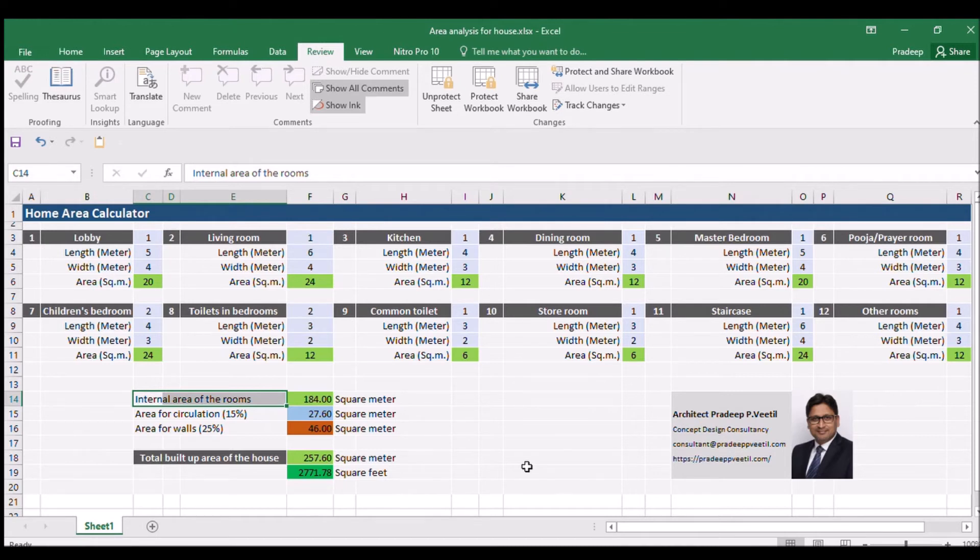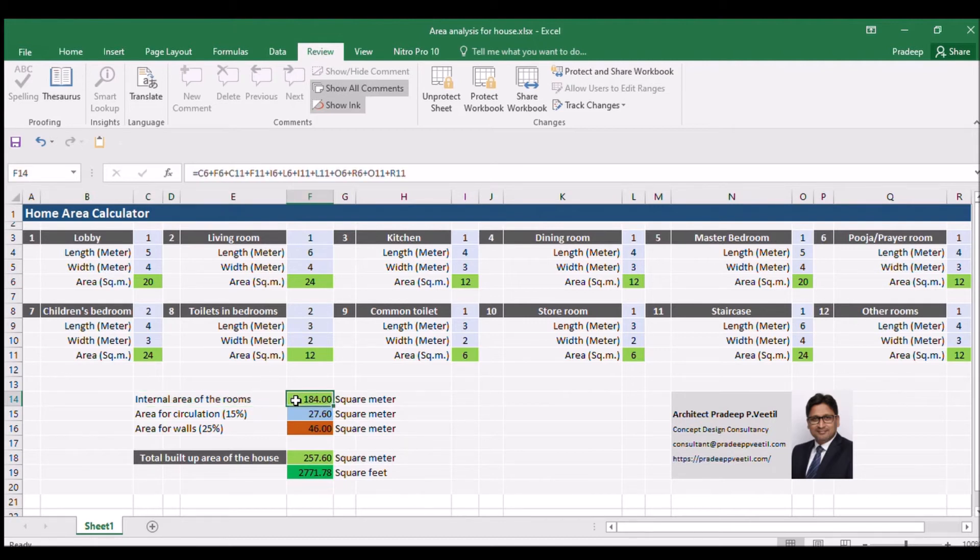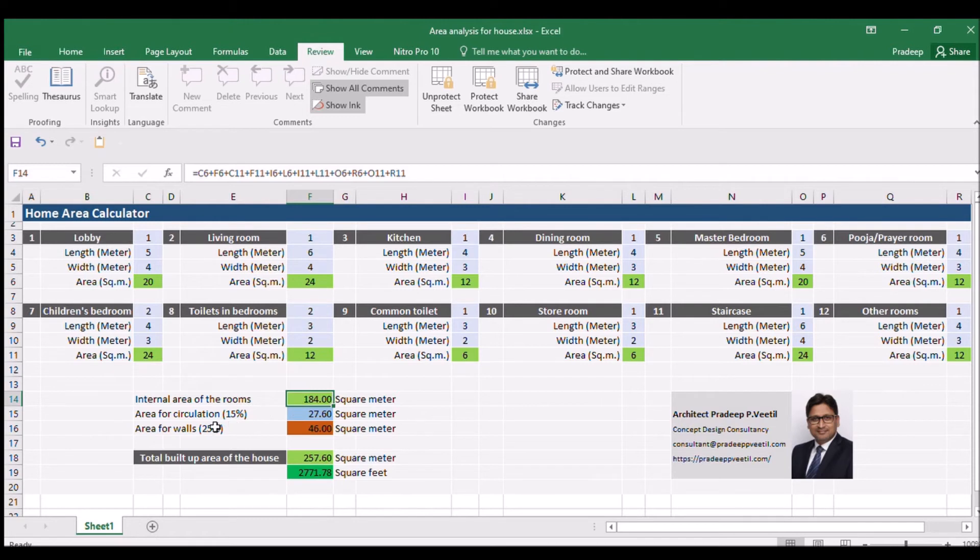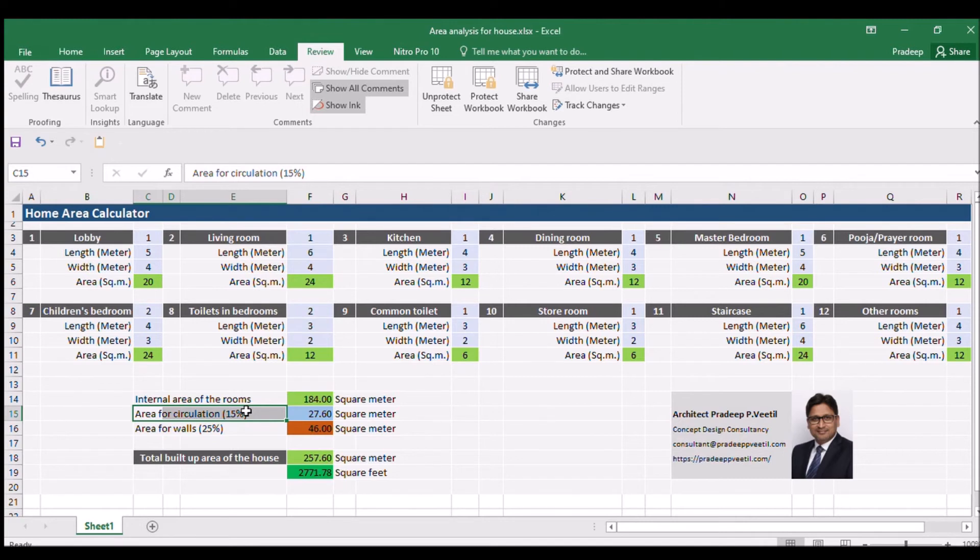The total internal area of the villa for this project is 184 square meters. The house also requires corridors and passages. This area calculator calculates 15% of internal area required for the passages automatically.